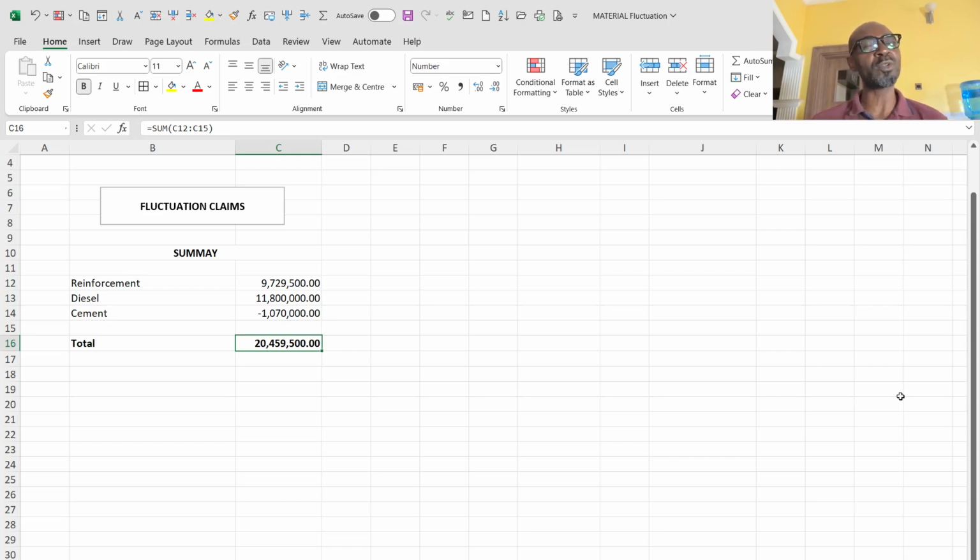I think option A is the one that allows the adjustment of the contract sum in case there are changes in the cost of levies, fees, taxes, and the like. While option B is the one that allows for the adjustment of the contract sum when material and labor prices change in the market. While option C is the one that allows the changes of the contract price using a formula method.